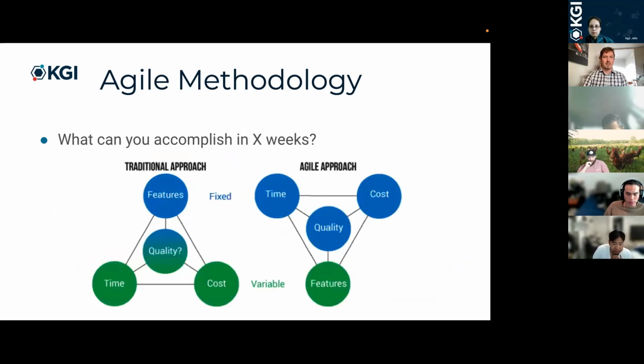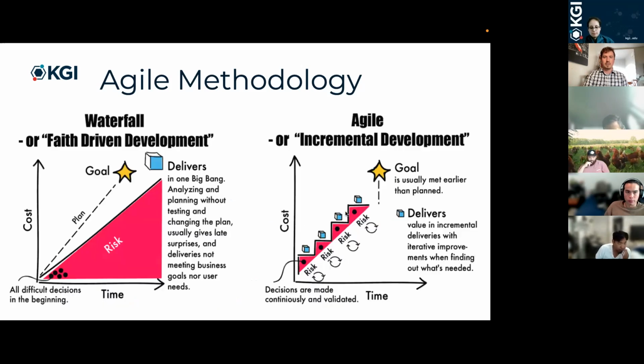And we'll talk about that later, but just to remind you all of this slide, a sprint is something with a defined time, defined cost, and then a defined quality. And by the way, this quality is just saying sort of like, if we keep time and cost fixed and we don't worry about the amount of features we do, we can keep the same high level of quality, right? Because we're not saying, oh my God, we just need to like get all these features done. Who cares how great they are? So this fixed time and cost becomes a sprint.